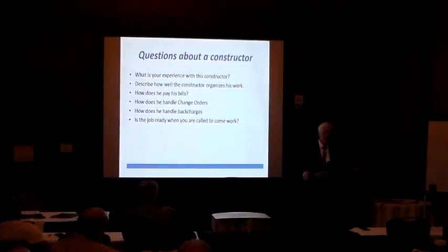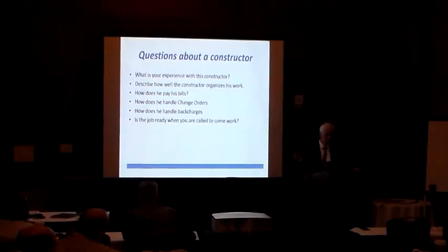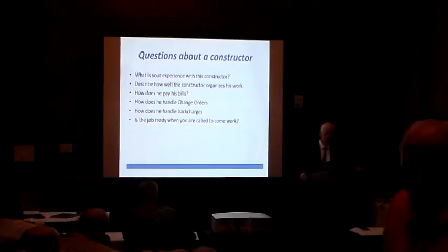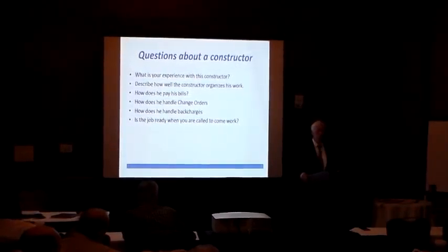In a CM process where you interview, you absolutely want to make sure that the team you interview is the team you're going to be working with. The people you want to be talking to are the project manager and the superintendent. You need to recognize that they very well may be terrible speakers, and so you want to ask questions that get beyond that and really hear what they're saying. But if they bring you the A team and then say, oh, we now need to use the C team, say, we're not going to have that. In hard bid work, you don't have any way of knowing that. You get who you get.